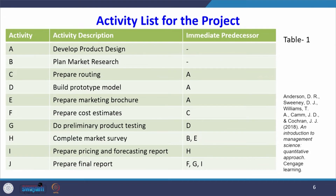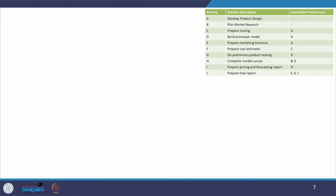Activity A and B have no precedence. C, D, E have precedence A. Like that, there are other activities with preceding activities. The precedence constraint needs to be considered while drawing the network.